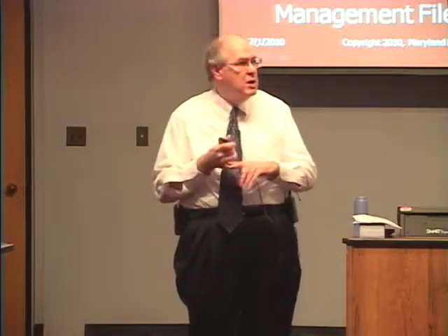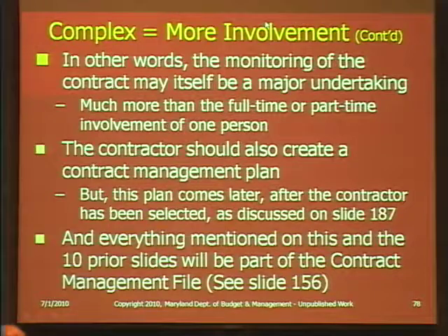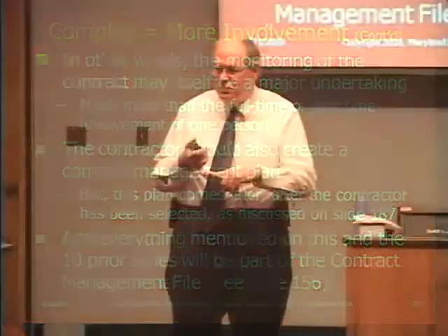And what we will emphasize is that if you have an evaluated procurement, the vendor's contract management plan should be part of what you evaluate. You want to see, at least on a draft basis, how the vendor is scoping out their intent to manage the project.